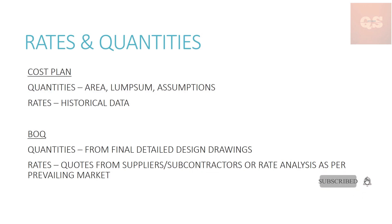The BOQ is usually prepared using the detailed design drawings available at the final stage. You will have all the documents and specifications, so you can easily take off quantities from the drawings using the different software available in the market. For rates, you get them from suppliers and contractors based on the prevailing market rate, and then you do your rate analysis and include that into your BOQ.